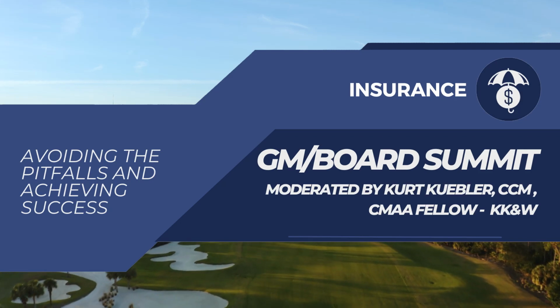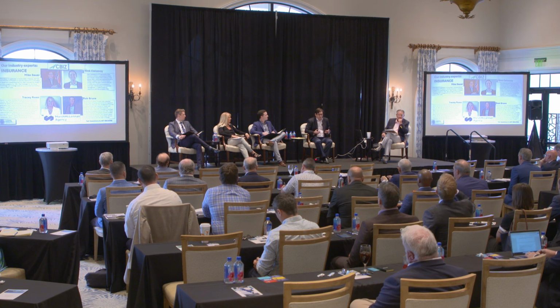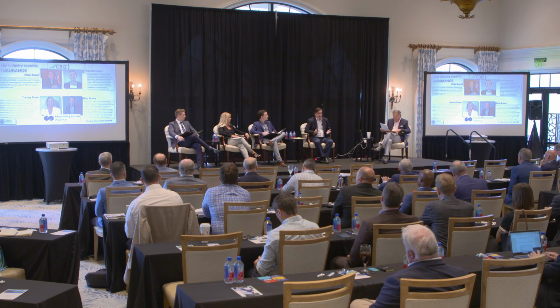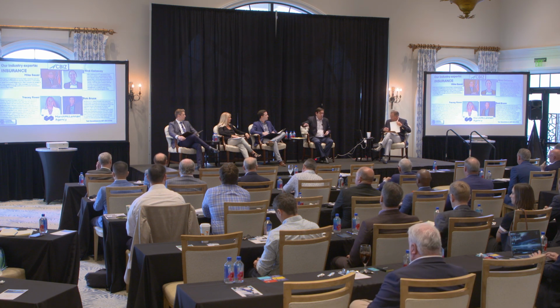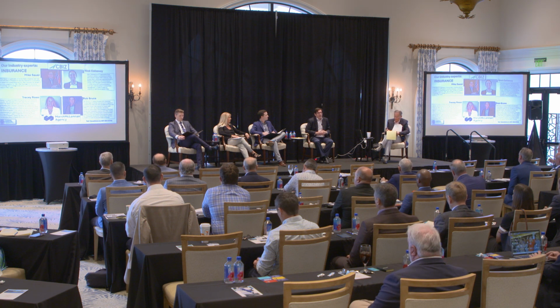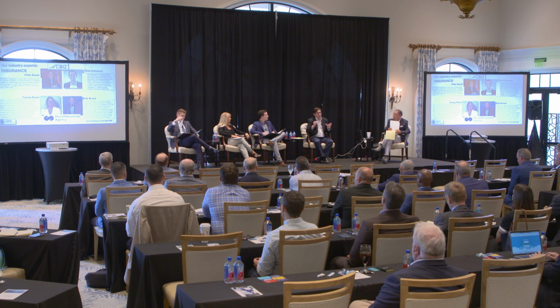Your current policy may provide coverage where a builder's risk policy may not be required. So it's really important that we look at what you're currently insured at. Now, granted, for the larger projects, anything that's new construction, if you're building out square footage, if you're tearing down walls, yes, it would be recommended that we look at a builder's risk policy. Of course, depending on the renovation size, part of your current property policy could still respond, but whatever's new, whatever's part of that project, can be insured elsewhere.